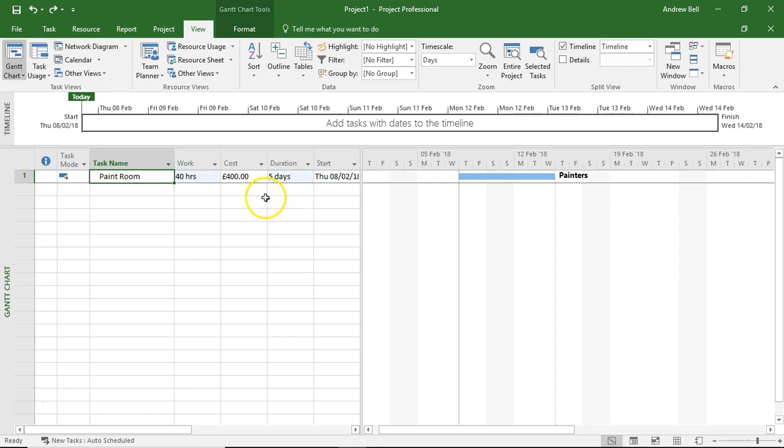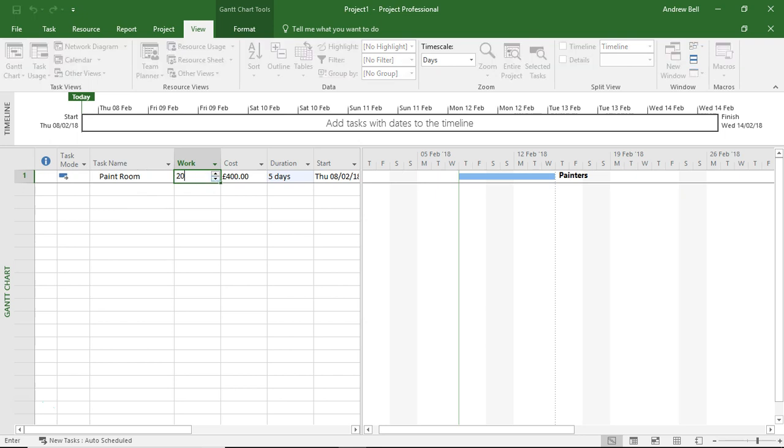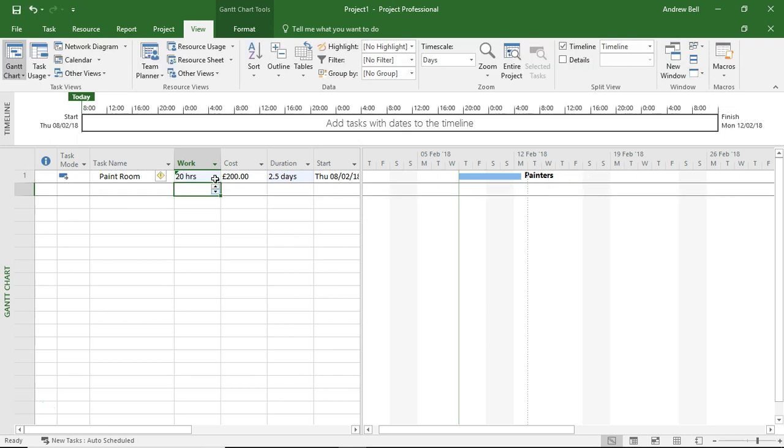In reality, the effort on this task is 20 hours. However, if I just put 20 hours in there, the duration reduces to two and a half days, which represents 20 hours.